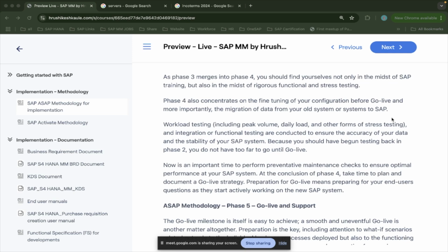Why? Because go live is when the stocks are uploaded. The customer will go to warehouse one, calculate all the material, and put it in the sheet, the format and sheet which we will provide him. Then he'll go to warehouse 2 and enter the material in the same sheet. Then warehouse 3, the material code and its quantity. Warehouse 4, material code and its quantity. All of that he will enter and pass on to us.